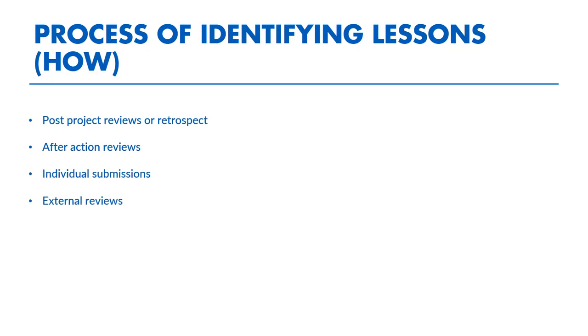Great. So I just wanted to, and again, this is quite brief and doesn't touch on the systems bit, but what do we do to identify the lessons from the work that you are doing? There was a survey conducted which identified a number of methods for identifying lessons. These included post-project reviews, which we have spoken about. It also included after-action reviews, which are slightly different and take a much shorter time period. There's also individuals, if you can speak to individuals involved in the project, and that's individual submission of the lessons based on that individual experience.